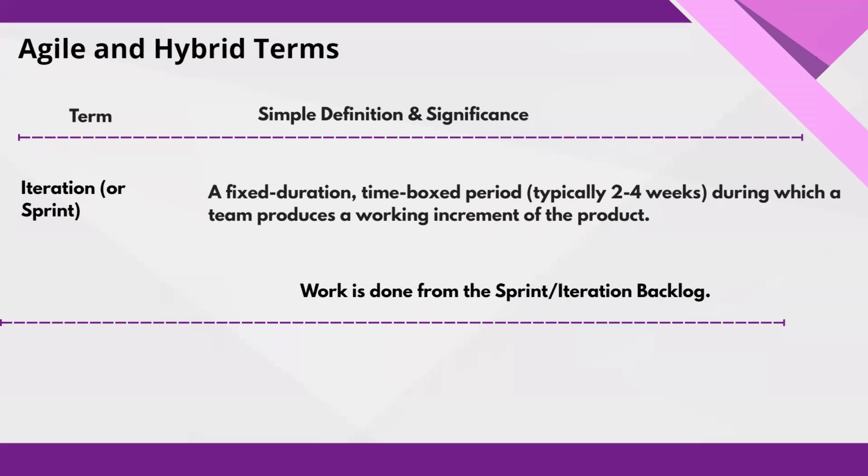Each sprint follows a consistent pattern. It starts with sprint planning to define what we will deliver. And then people continue with daily scrums to track the progress. The sprint ends with a sprint review to show the increment, and it wraps up with a retrospective to improve the next sprint. Why it matters is it keeps delivery predictable and frequent.